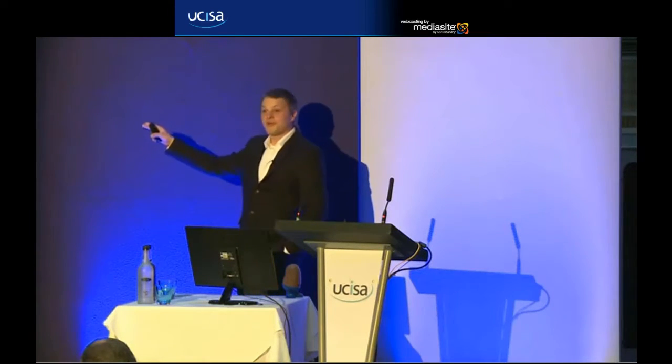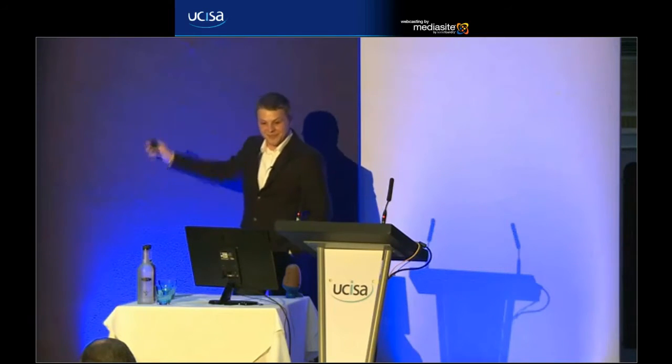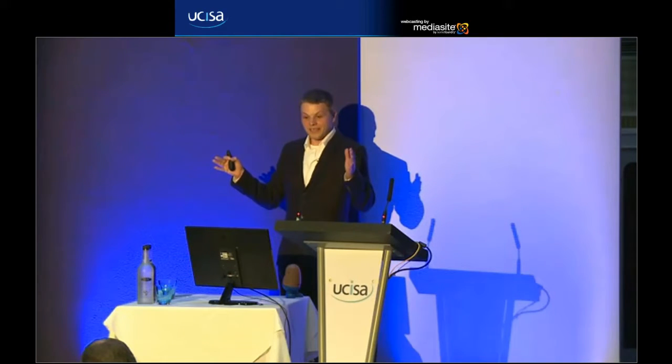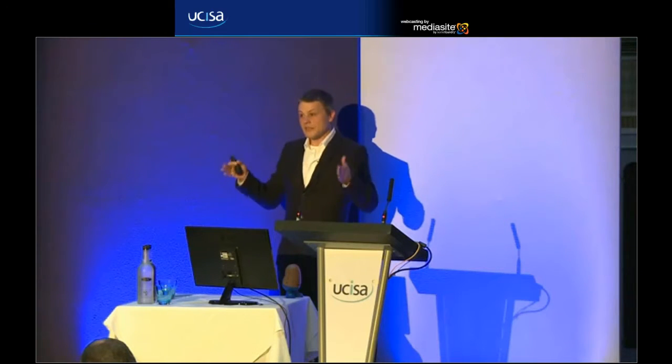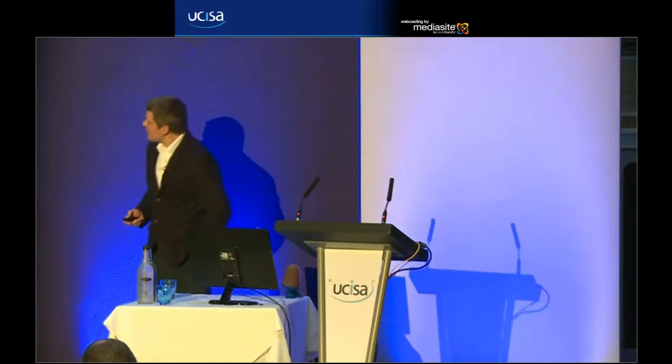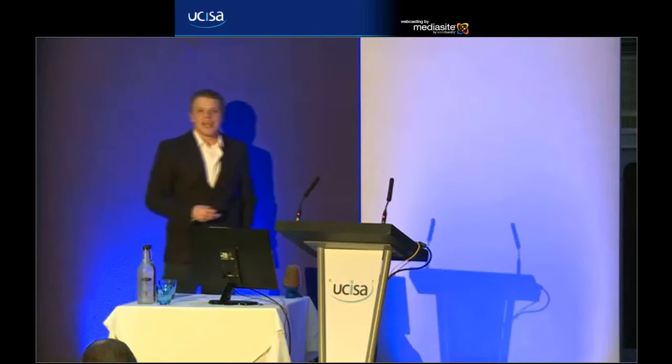I apologize, it was white on my slide, this text, it's come out black unfortunately on here. A 3-week schedule where we're going to do a piece of work and go through all the sprint backlog, and the developers agree and make a commitment that that's what we're going to work on in that period of time. We then produce at the end of this a production-ready product increment.